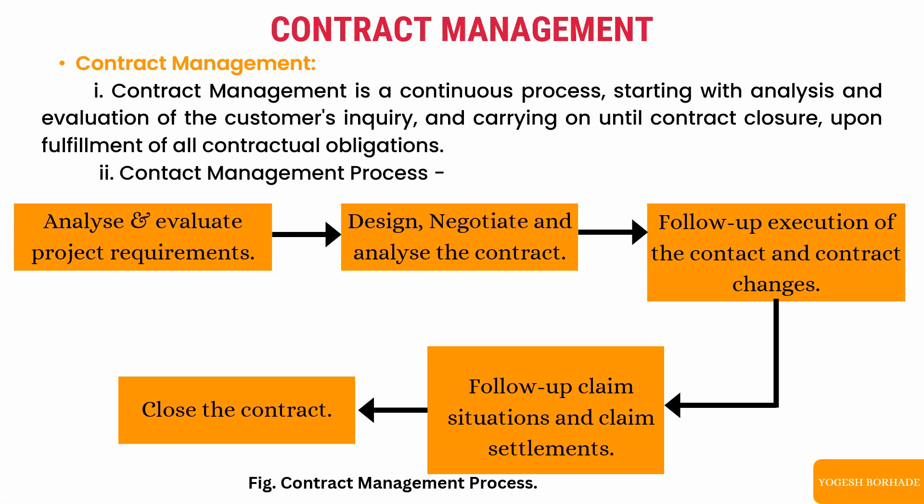After execution, we follow up on claim situations and claim settlements. It may happen that while developing the project, we find it cannot be completed within the allotted time or within the given budget. We then report this to the other party, and depending on the rules and regulations of the contract, claim settlements are done. After that, we close the contract.